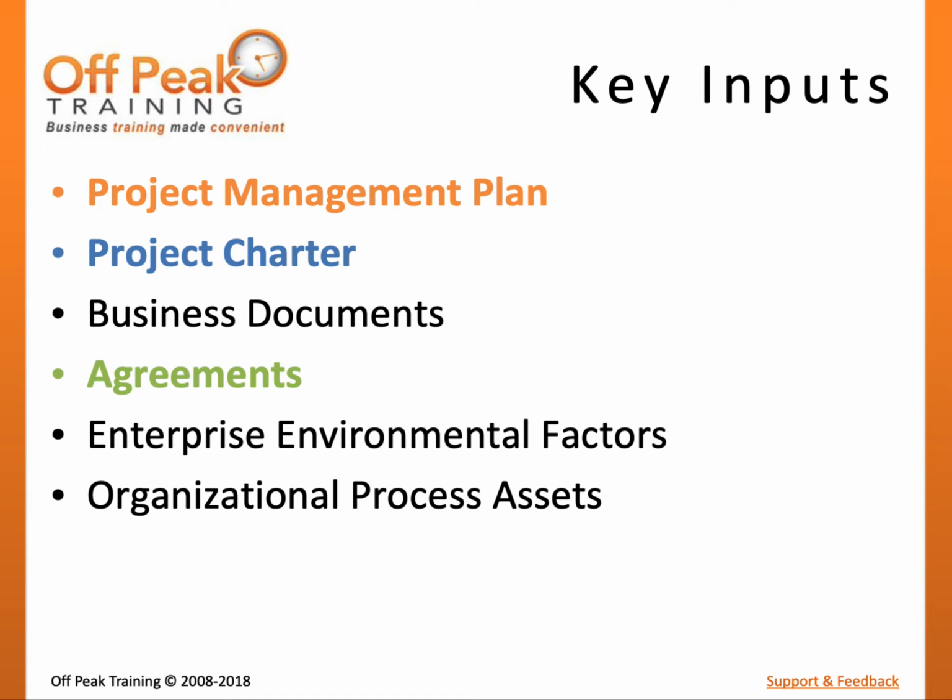The PMBOK guide defines a few inputs to the Identify Stakeholders process. The first input defined is the project charter, which is a project document formed by the project sponsor to authorize the project, its funding, and name the project manager. This document should directly indicate who the sponsor and project manager are and may indicate other team members, the customer, or external parties that will be involved. The business case and benefits management plan may have provided initial lists of stakeholders before the project was initiated.